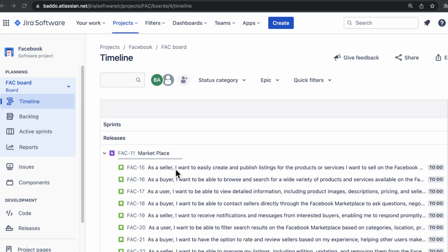Yeah, that mostly brings a lot of grudge, let me put it that way, between product owners and developers. So if you're a developer, you don't want to go ahead to develop anything without acceptance criteria. Acceptance criteria more or less becomes like a contract between you and your product owner. So for every user story, no matter how well you understand it, you want to add a description and you want to add acceptance criteria. So let's just do it for one of these.